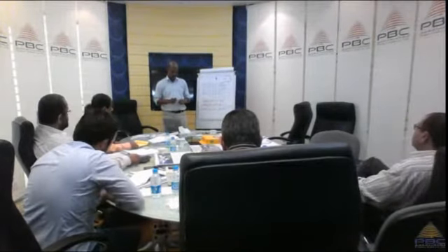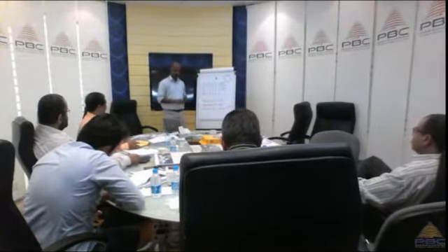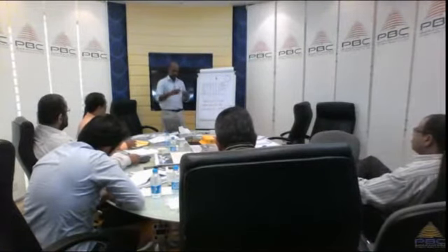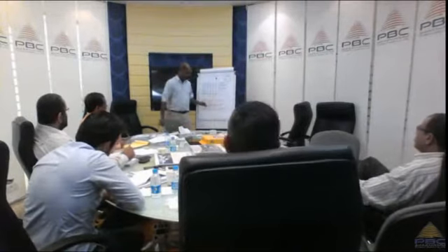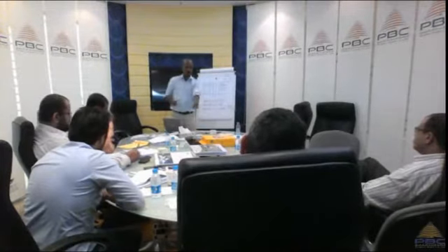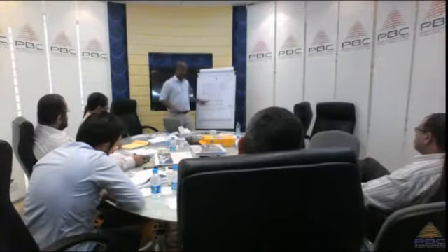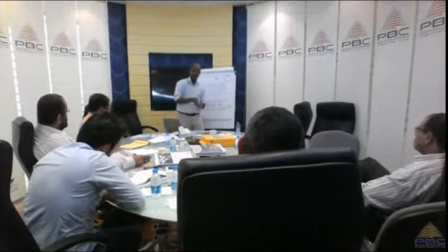Does it make sense? Time is different, related to the cost. Let me go back again. When I say the value of work I created now is $2, but according to my plan it was $3, by this day I should have done more.